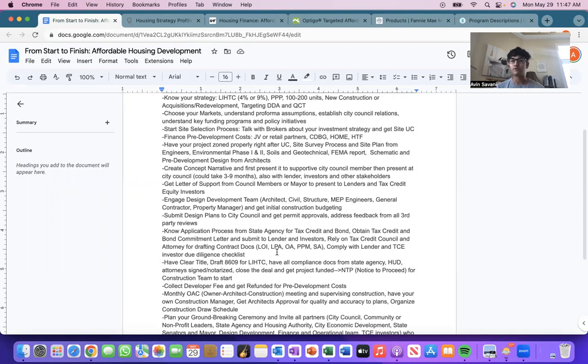Whereas if it's privately owned land and that landowner wants to pretty much close on their project and realize a profit instantly, maybe like a 60-day due diligence or a 90-day due diligence timeline, it's not as feasible with an affordable housing project, which can last upwards of 2 to 3 years in planning, right? So that's another thing to watch out for. And with that, it might be better to acquire that piece of land that is privately owned, especially if you like that area a lot, with some pre-development budget, right?